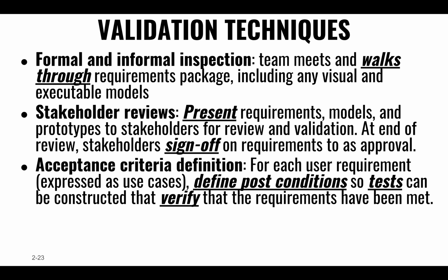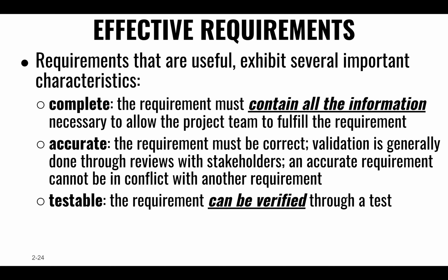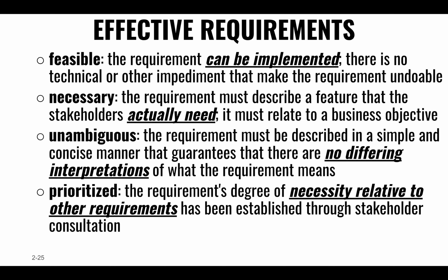But at some point we need to feel confident enough that we can sign off, and this would be the core set of functionality and value that we're going to be building. So we ask the stakeholders to sign off, not as a contract, not as something fixed in stone that will never change, but at least as a milestone that we have matured enough that we can start building something.